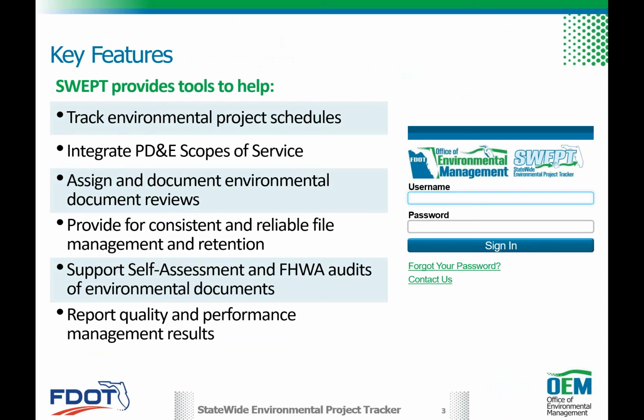every night SWEP gets a dump of PSM, looking for the appropriate FMs and the various project schedules. So you have this dashboard interface that allows you to see the various milestones per class of action for each of these documents, to know when certain reviews or approvals are anticipated, or activities are to be completed.